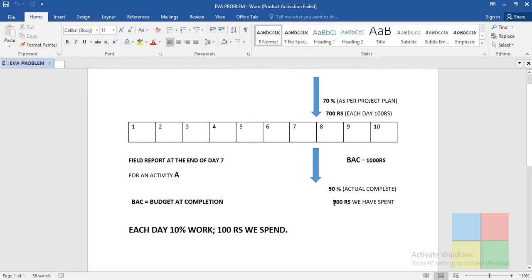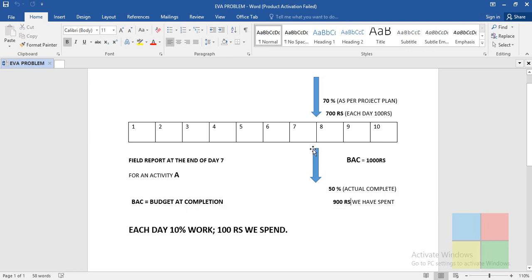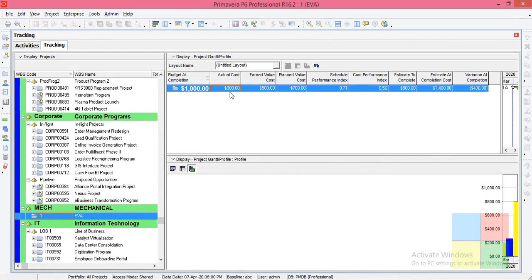Actual Cost is how much we actually spent. In this problem, at the end of the seventh day we had finished only 50% of the work, and at the same time we had spent 900 rupees out of 1000 rupees. So this 900 rupees is the Actual Cost.